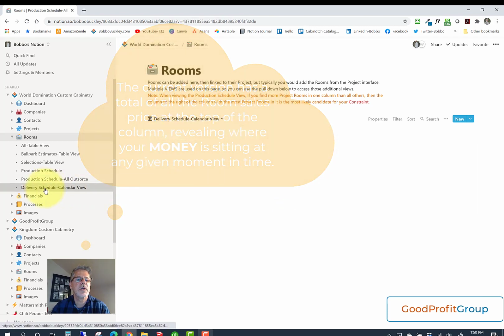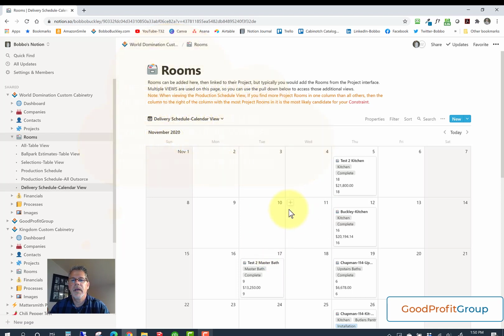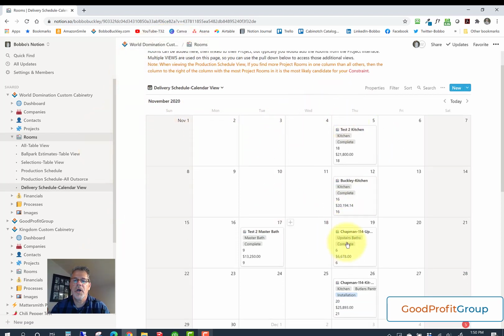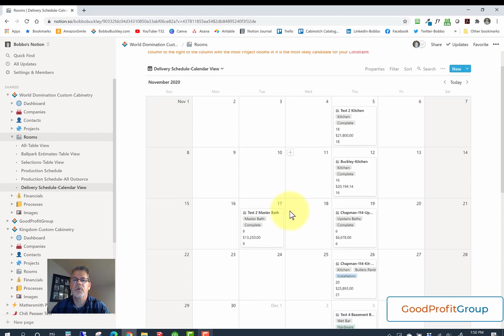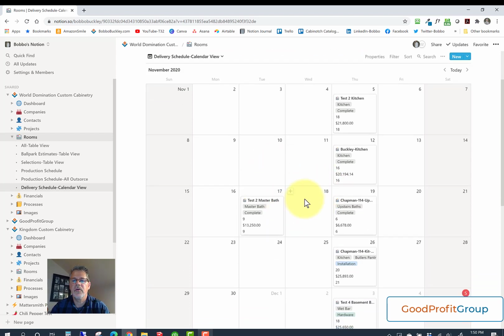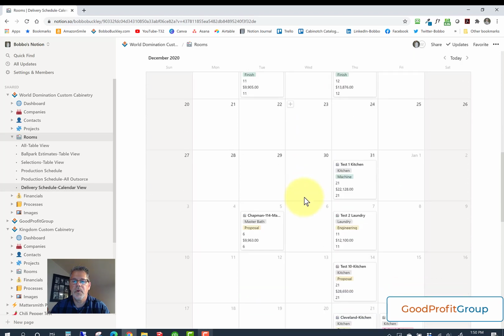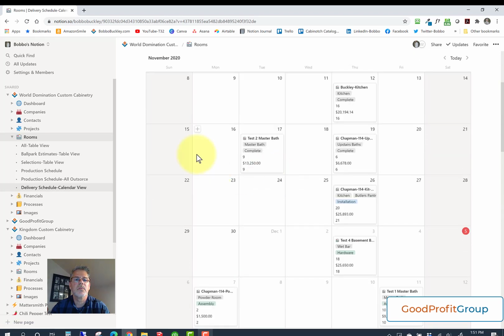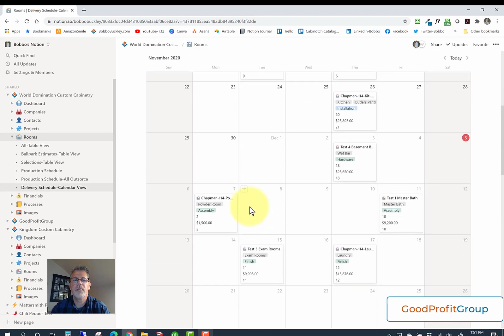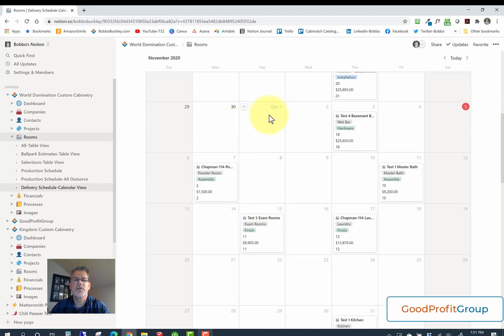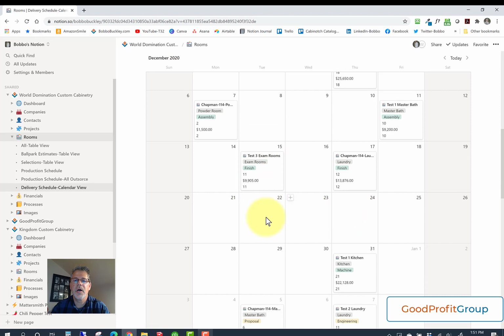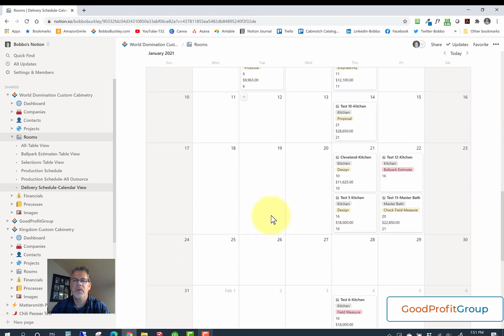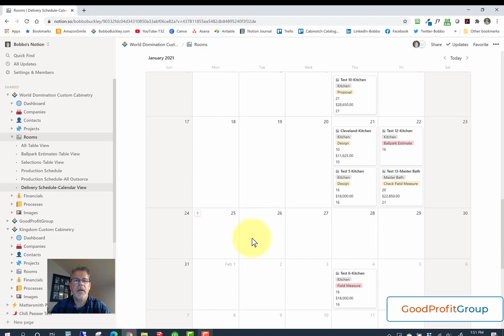And then your delivery schedule is a calendar view, and the calendar view helps you sort those jobs where they go, and we'll look at that again shortly, and I'll explain a little more about it. But this calendar view is how you come in here and decide where your next job can go. We're in November right now, scrolling through November, and here's December 1st, and we're coming through and say, well, we wouldn't want to put a job on the week of Christmas, so keep coming into January. Right here is a week that we could probably put something, but we would want to look at the dollar volume in the jobs we've plugged in here already.